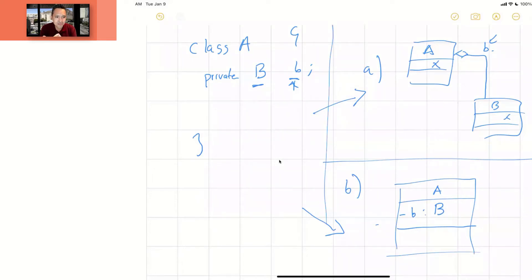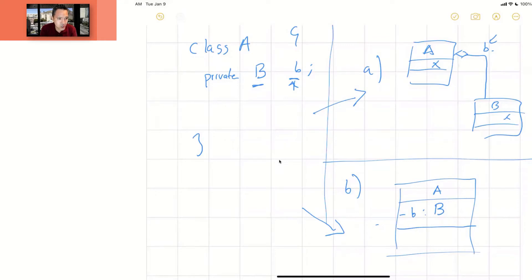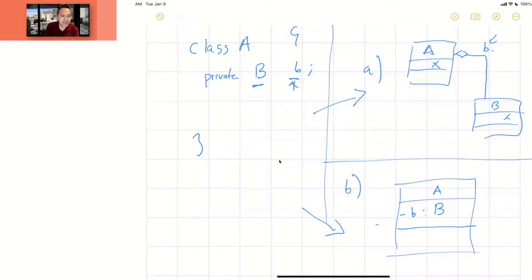Refactoring is part of your work every day — it's not specifically part of a project. It's not part of the value in the project. So: not in the backlog for the diagram, and for the code only if you're fixing something that has value for the customer. Clean code does not have direct value for the customer — it's indirectly useful because you're creating extensible, modifiable software, but it's not something the customer explicitly asks you to do. So no user stories for that.